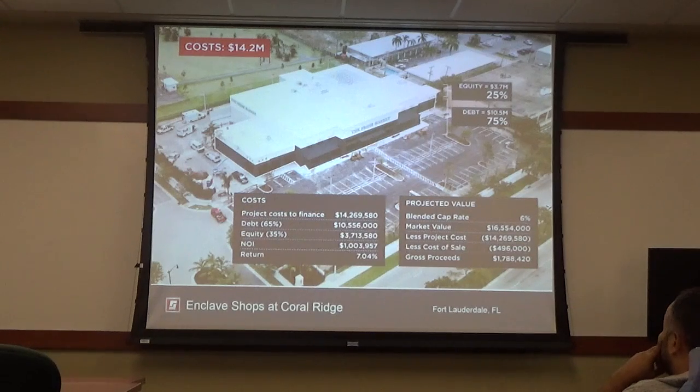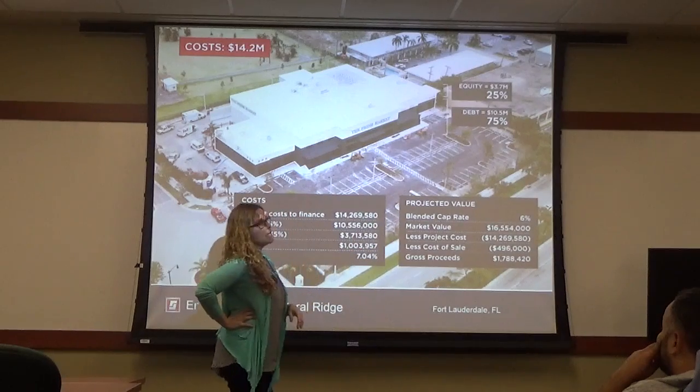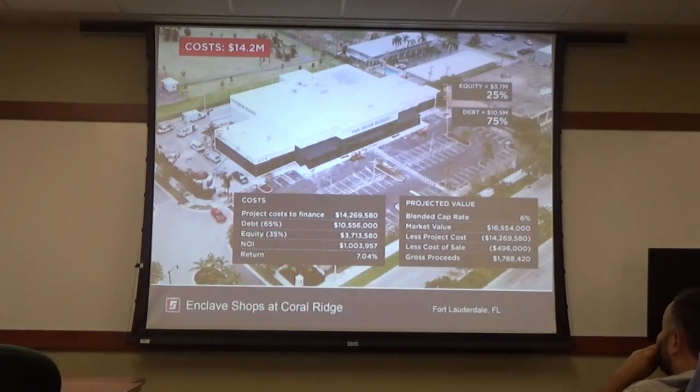In that deal, did the GC do the TIs for all the tenants, or did you hire someone? No, what we did is we had the restaurant here negotiated, and we have a nail salon over there negotiated. So since the GC was already on site, I had them do the landlord's work. Fortunately, we were in a position where I just had the architect redraw the landlord's work, and I submitted a permit revision and got the GC to do the work while they were still there on site. Now the other two spaces that are available, we delivered them in what we call a vanilla box. So it just has the walls and AC, but it's just a plain space. And when we do lease those, if there's any work to be done, that's when I hire the tenant improvement coordinator, and he will coordinate any landlord work changes or make sure the tenant gets their work. And that's a different guy.